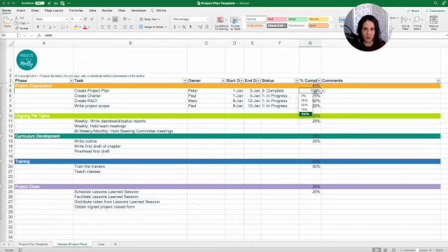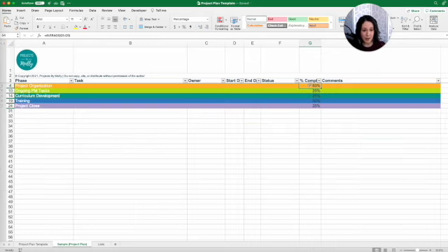And when it's all done, then you would do 100. So note too that with the percent completes, I'm actually doing some math here. So I'm taking the average of everything within a phase and I'm calculating it automatically in Excel. That's a great feature too. If you are collapsing, you can get just sort of the sum total, and Excel will actually tell you, oh, hey, down here, my average is 38% overall.